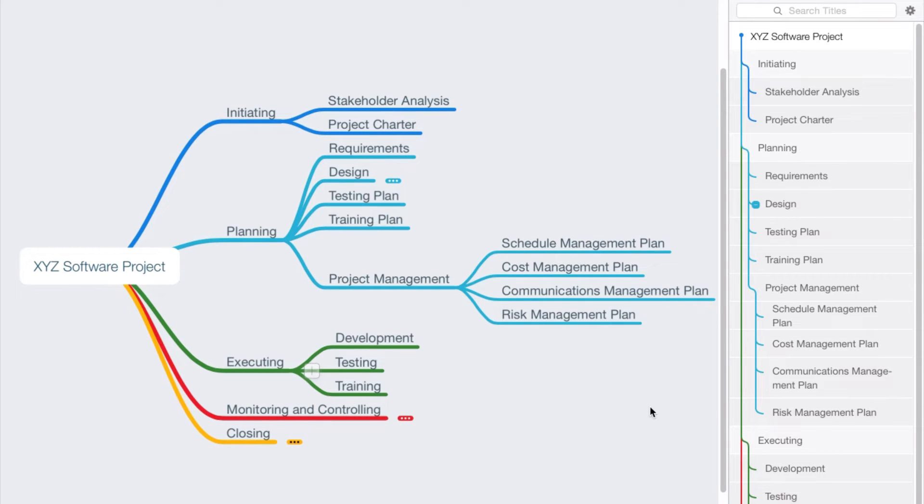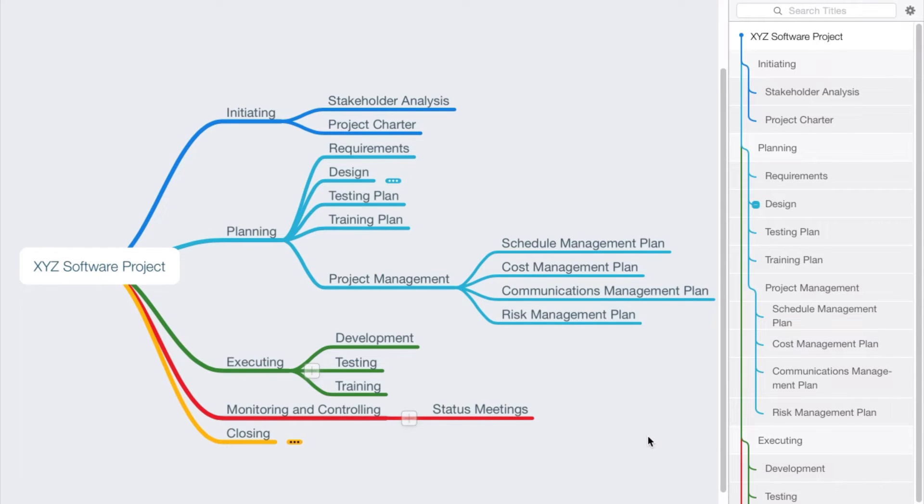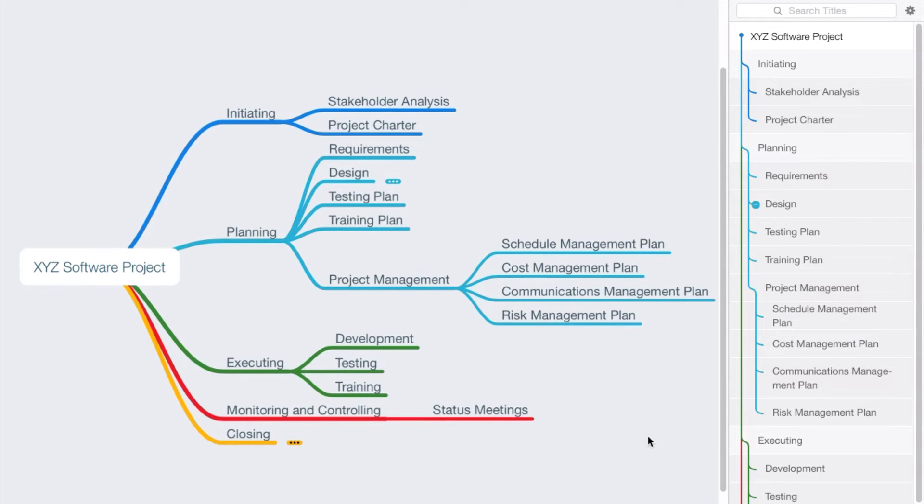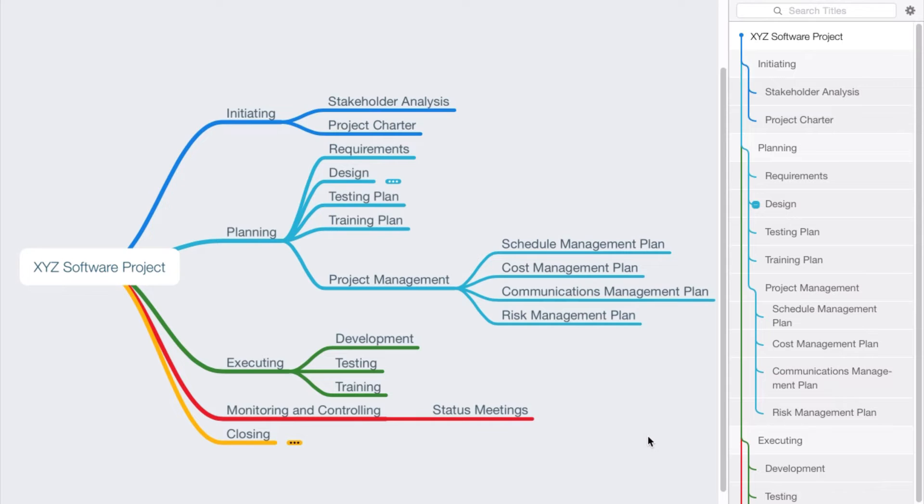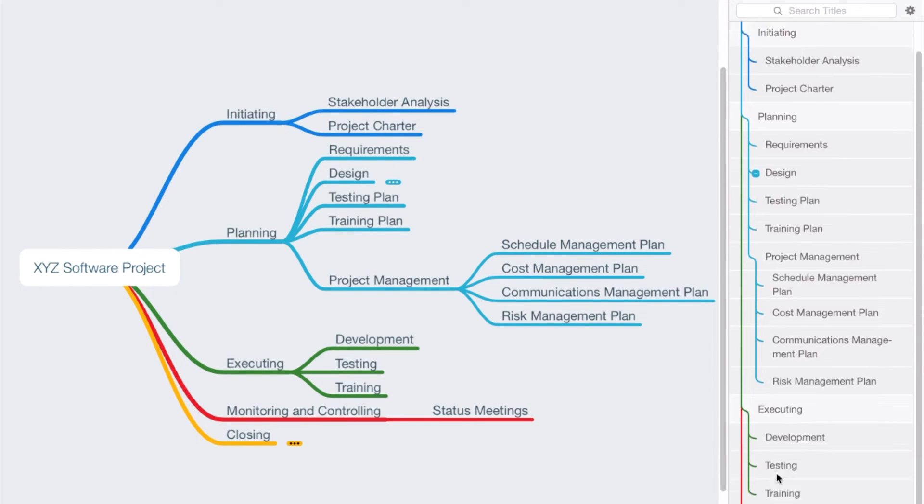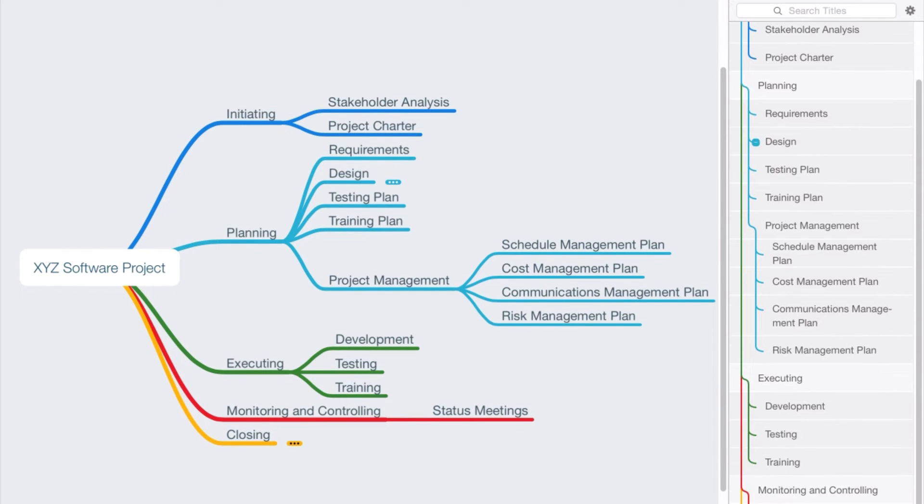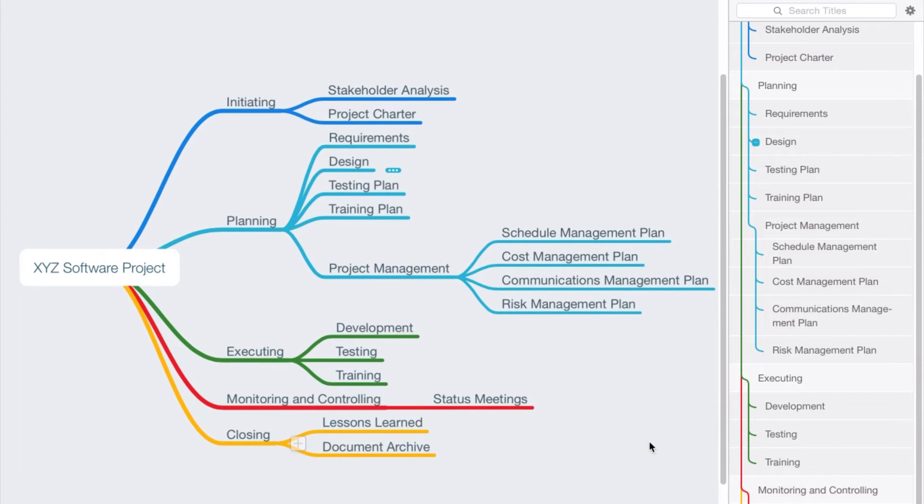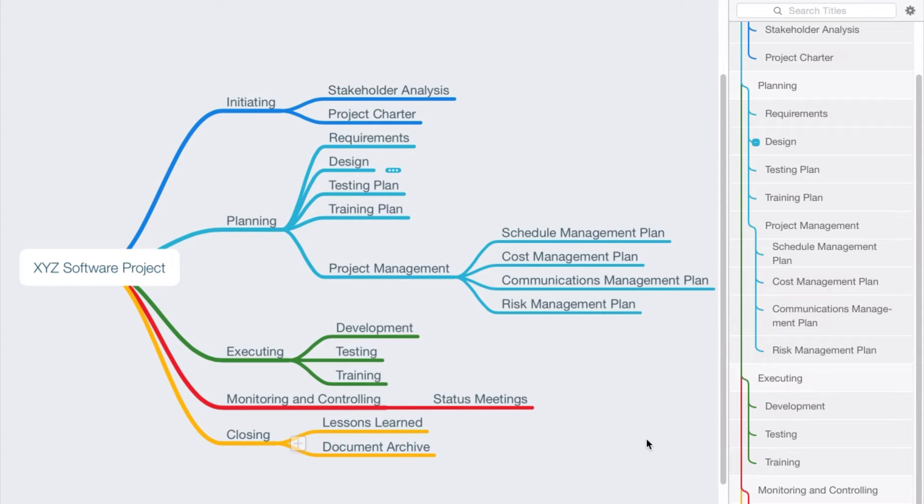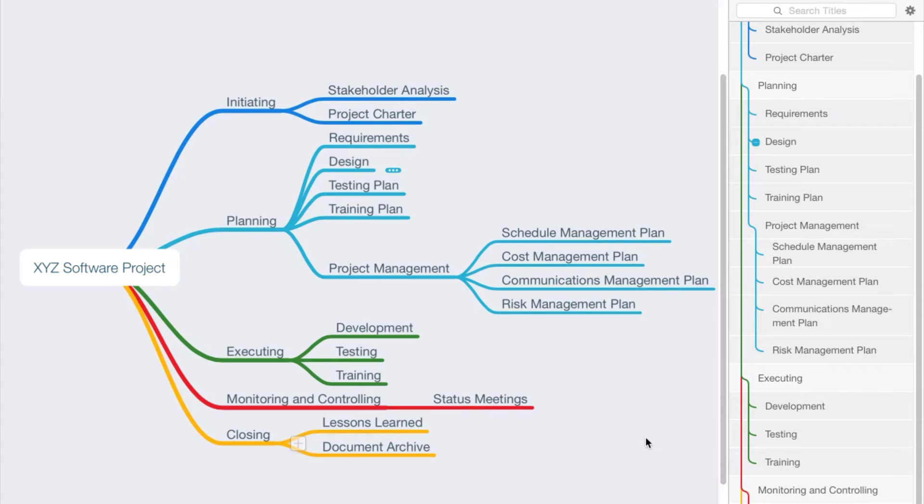In the executing process group, we might say we have development, testing, and training. With our monitoring and controlling, we might say we'll have status meetings in which we're going to do some variance analysis of our budget as well as our schedule. And then in the closing process group, we might say we're going to do a lessons learned or create a lessons learned, as well as a document archive. So here's the breakdown, a simple illustration of a work breakdown structure in a mind mapping tool.